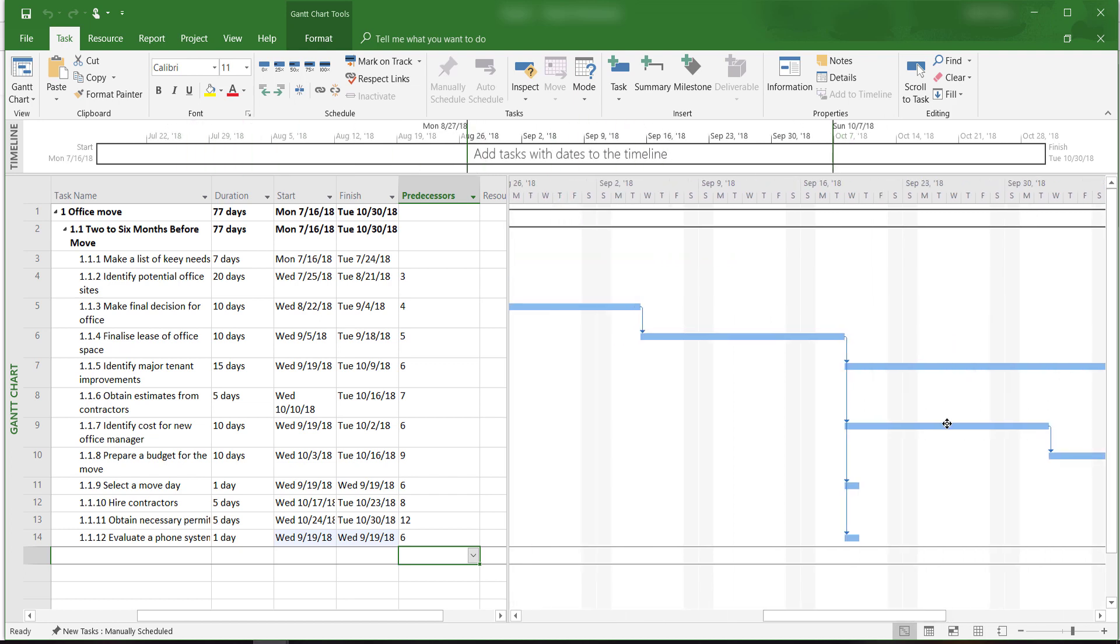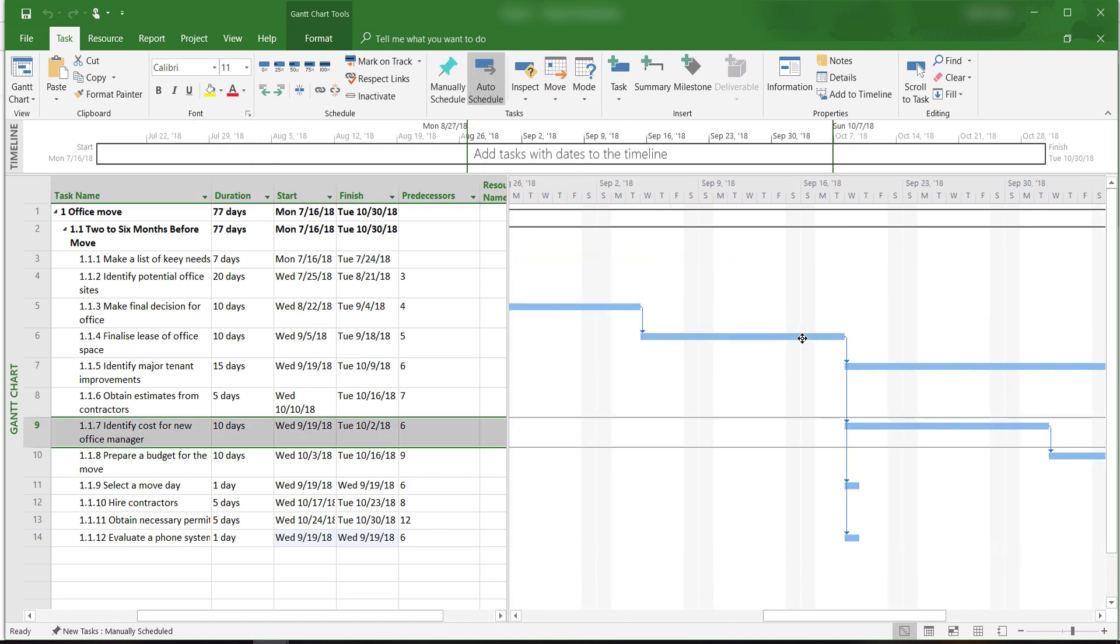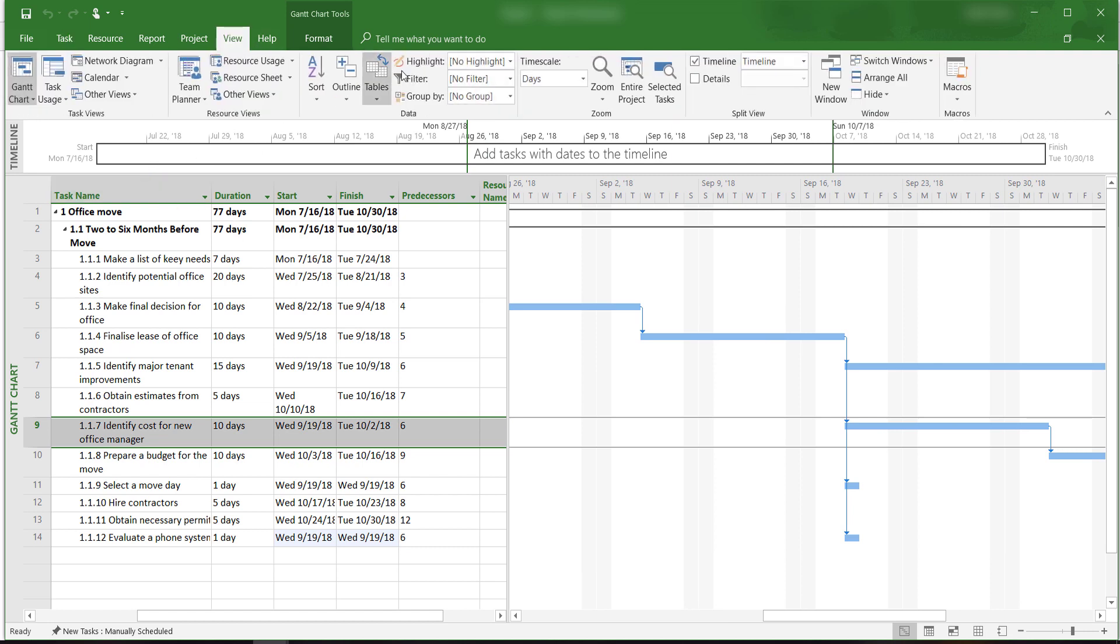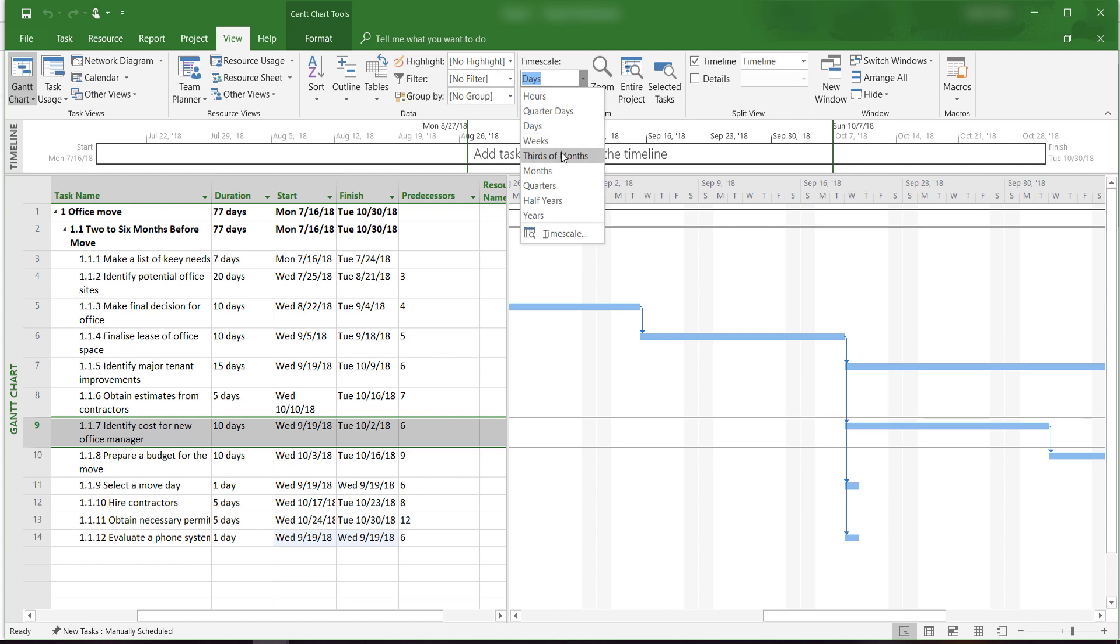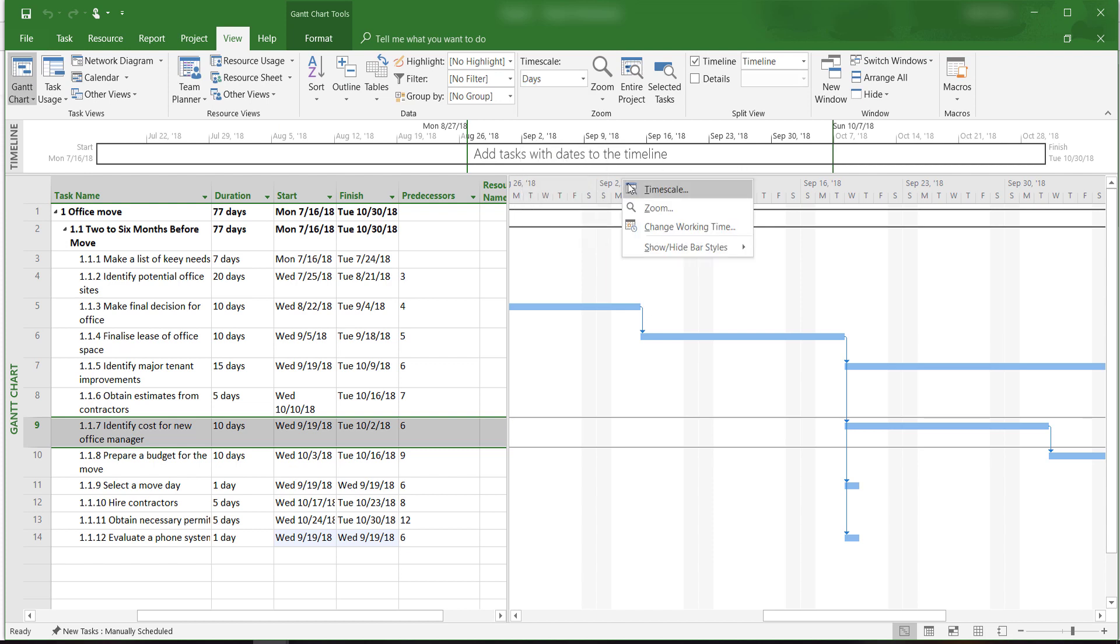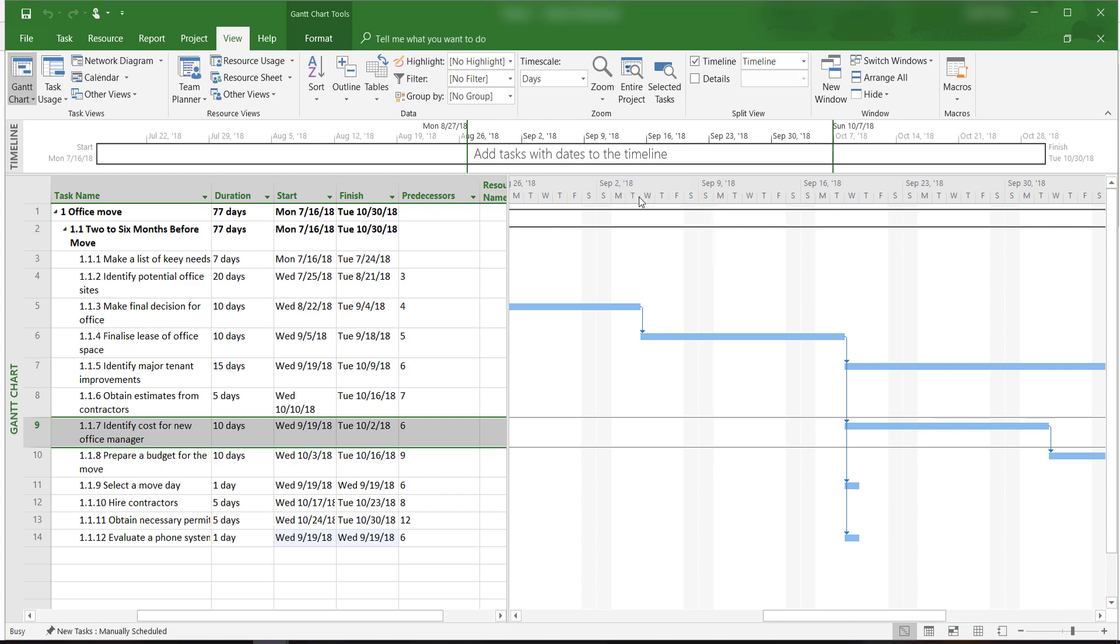We can change the bottom tier very quickly by going to the view tab and clicking on the timescale drop-down menu. We can also change all tiers by right-clicking on the timescale and then clicking on the timescale. A window will appear.